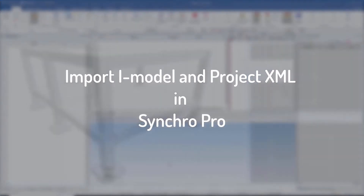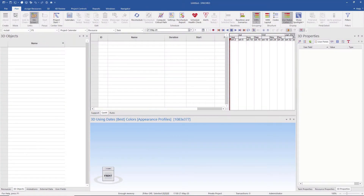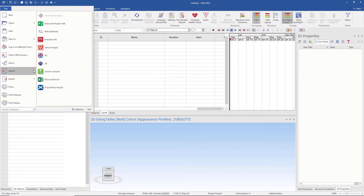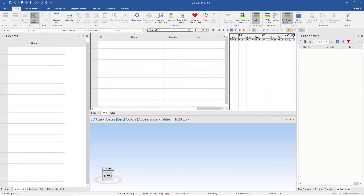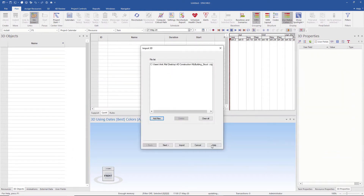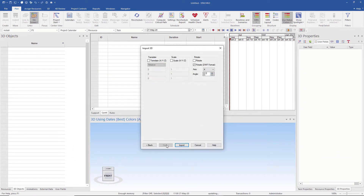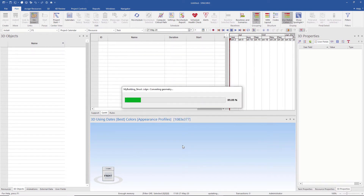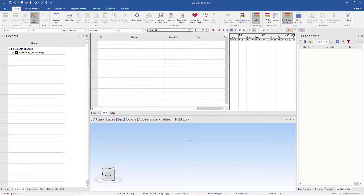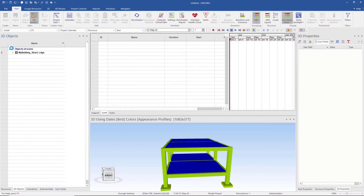Once the iModel is published, we open Synchro Pro and import the iModel. To import, we go to Files, then Import, and click on 3D. We select the iModel and proceed through the import steps. We make sure that this is a resource and the resource type is material. Finally, after importing, we can see it by turning it on from the 3D objects.